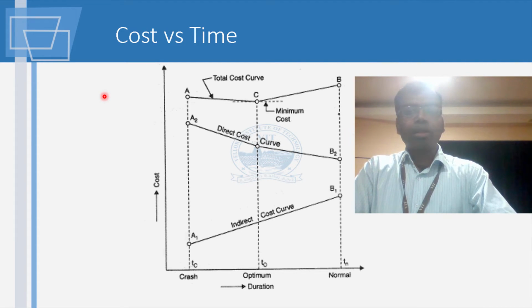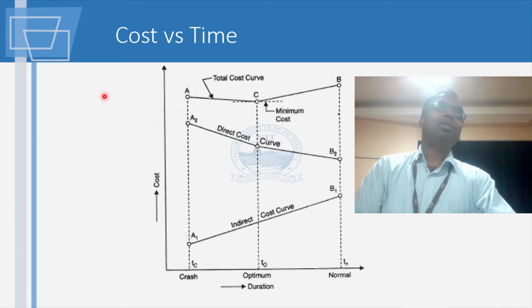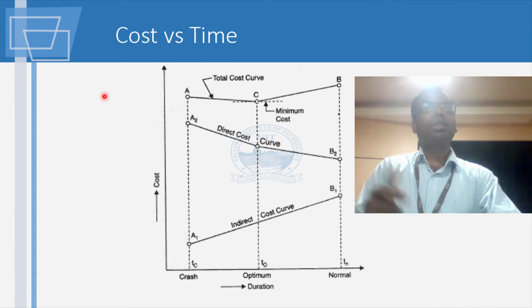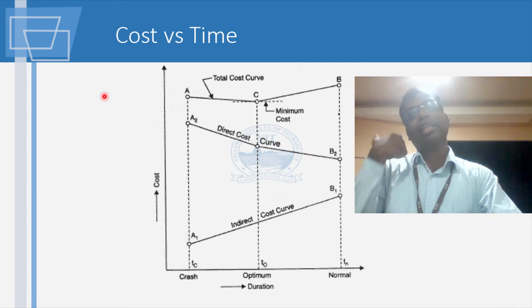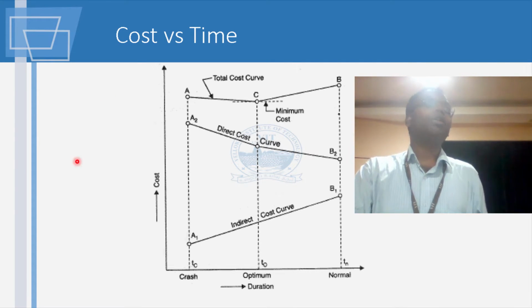Okay. So what is crashing? Crashing means you're putting in more resources. You may be spending much more money, but you're reducing time. The other thing is also possible, where you try to stretch time by reducing the resources. So that also you could probably do depending on what the project requirement is.